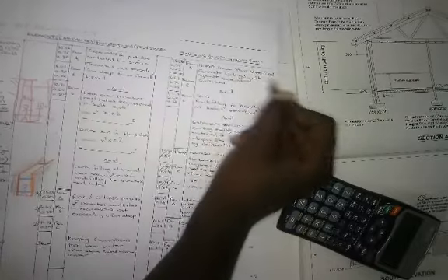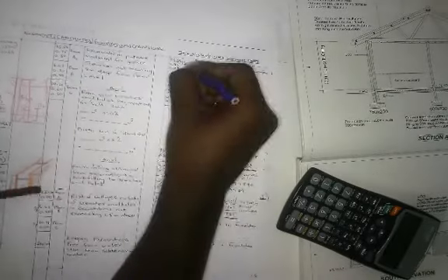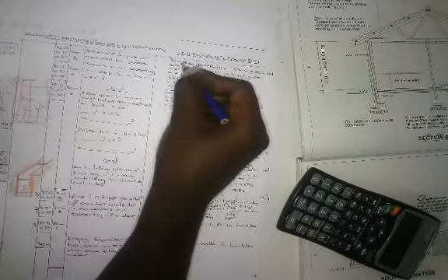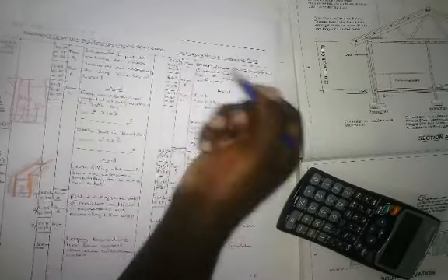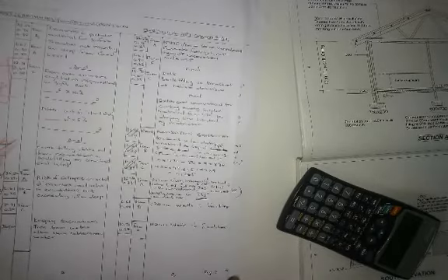Here's your concrete, same thing. We know from our collects that it's a 750 wide by 230 thick concrete footing. So you just transfer this information into here. We've got a 10 MPa, let's say 19 mil stone unreinforced concrete footing cast against excavated surfaces. So you take from A, which is your collects again, 35.56 times 0.75 times 0.23. You do the same even for the 230 wall and 110 wall.